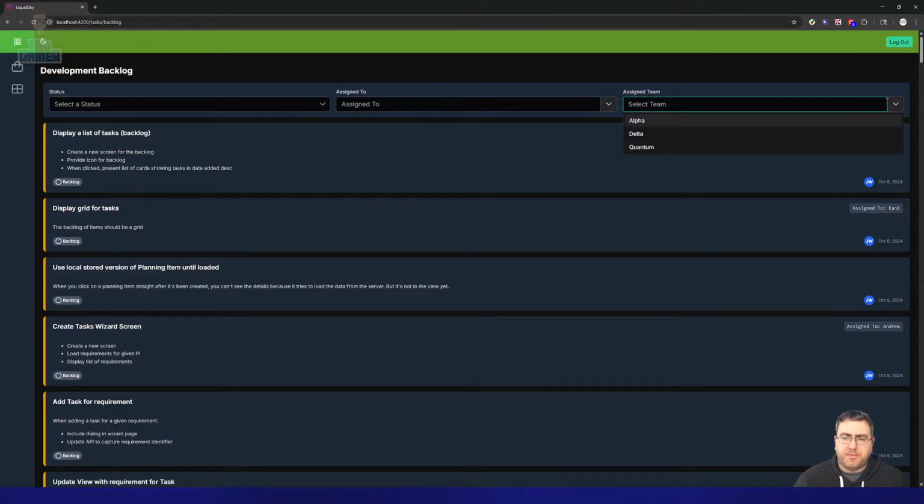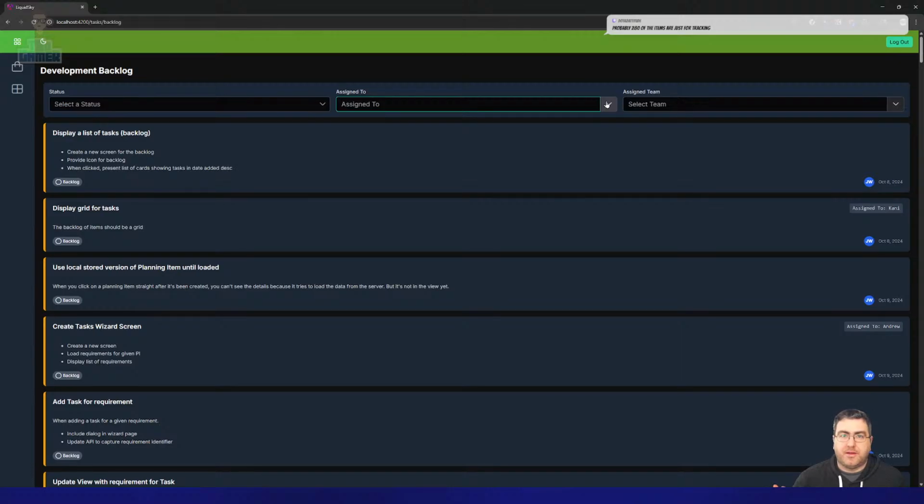I'd question 300 tickets being effective. If you go out too far, just for tracking what? If you go out too far with planning and you try and add a lot of details, the problem is it's wasted time, because things that happen in between getting to that ticket could change the scenarios, could change the situations. So you might have some placeholders at 3 months out. You might have some placeholders even at a month out. But you should have really high planning within the month and enough backlog to build on in the 1 to 3 month period. Anything 3 to 6 months out is planning, which is exactly why I don't want to present it here.